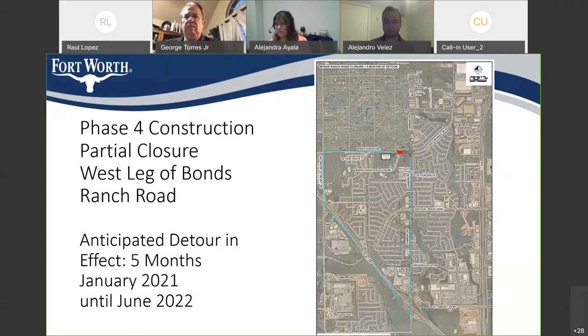Yes, we appreciate the feedback. The city has had this program for as many years as I've been with the city, where we notify all the affected customers, even if it's for shutting down an 8-inch water line. This is a large water main. So we will send notifications at least 2 weeks in advance, including electronic notifications via social media, so that everybody's notified. And this shutdown needs to happen between December and March precisely because that's the low demand window for water. So it cannot happen in the summer.